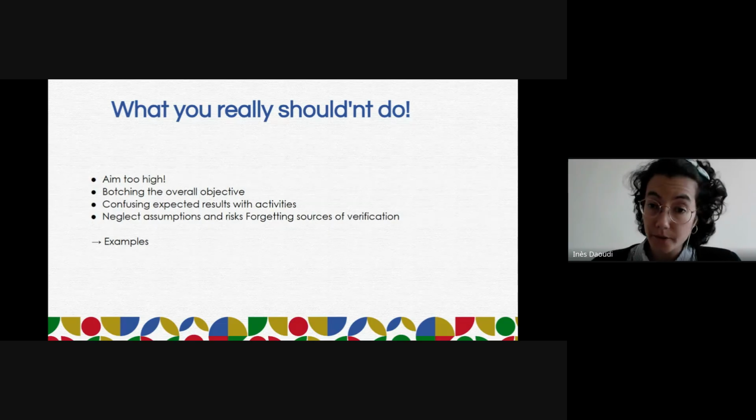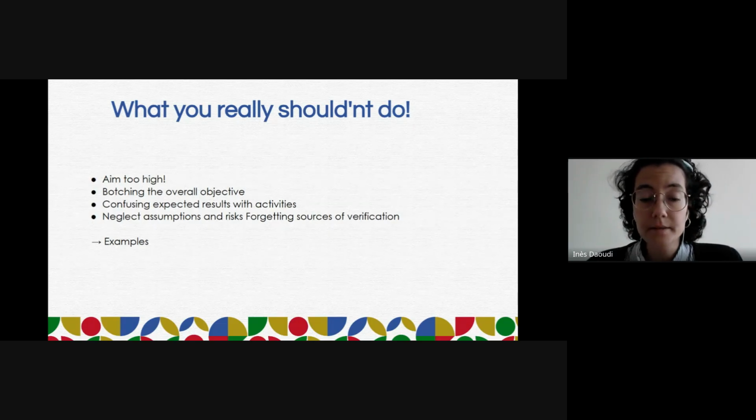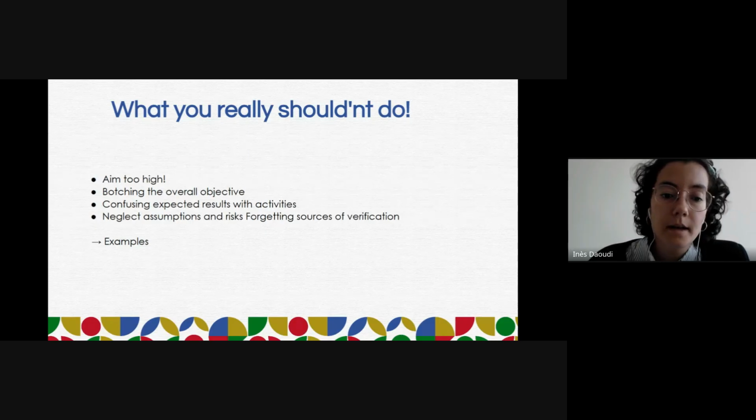On the other hand, if you write contribute to the sustainable improvement of living conditions for vulnerable populations in any region, you choose the region, this is way more realistic, because it will focus on a specific region first, and then target a specific group in this region, and it aims for sustainable improvement rather than the complete eradication of poverty.